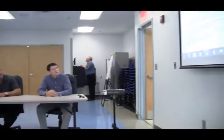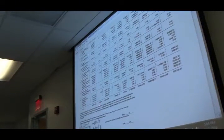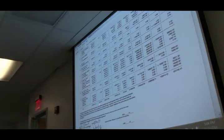I'm going to go through the monthly ritual of going through the pay app here. Carla, if you will scroll to the bottom, I'm just going to show you again. Here is your total construction cost at the ELC, $2,384,922.83. We've had change orders approved to date of a deduction of a little over $4,000. Actual current contract cost.